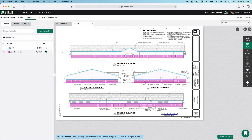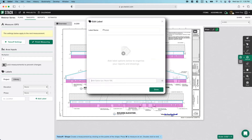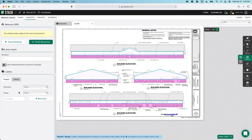Let's go ahead and add an additional grouping just to see what two groupings looks like. Let's create one for a phase, and I can say we're going to have a phase one and a phase two. You can create up to 10 levels. So think of it — if you want to group by division four for masonry, then by building, then by phase, then by floor, then by room — you can get as granular as you want within STACK. You can go 10 levels deep on the labels, plus plan name, which gives you actually a total of 11 layers.